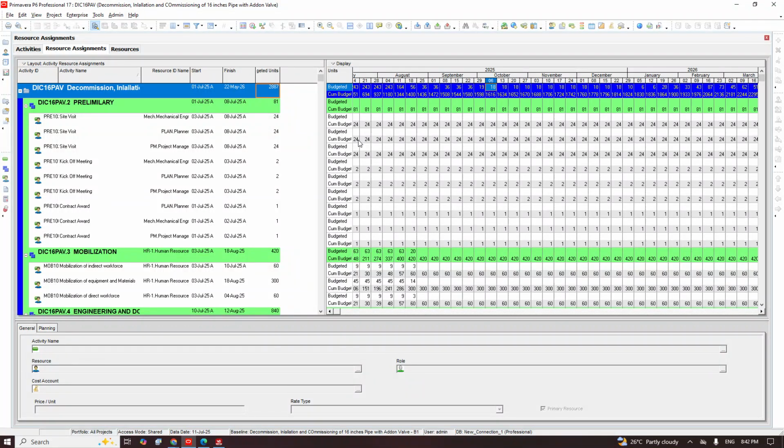Remember, the area we are going now is that we are weighting our project into 100%. We want every day the guys are working. We are reporting this project in terms of percentage. Today, 1%. Tomorrow, 1.5%. Maybe they added another 1%. It becomes 2.5% the next day. So this is how we want to be reporting this project. And that is what we are going to develop now.